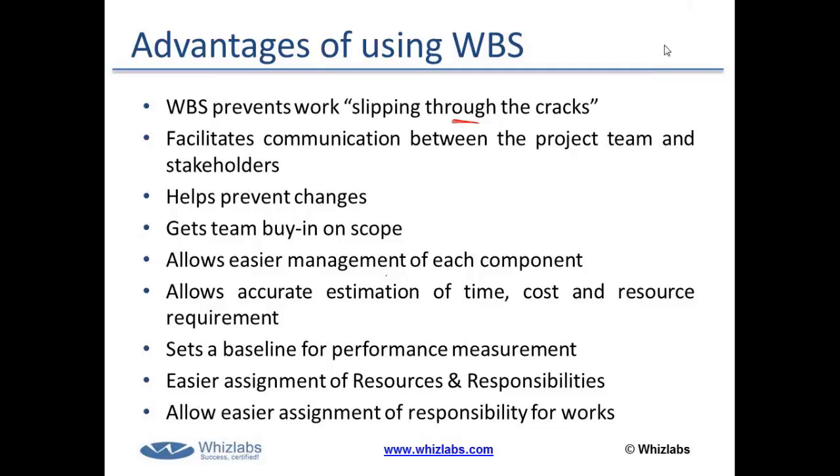Once the WBS is created, you take a sign off from all the key stakeholders and you freeze the WBS. Any change later required in the project scope has to be amended within the WBS, and the WBS has to be baselined once again. I told you that WBS is part of the scope baseline, so every time there is a change in project scope, you have to adjust the baseline. That adjustment has to happen in the WBS as per the theoretical concept. Every time there is a scope change, you have to update the WBS and also the project scope statement. Okay? Thanks.